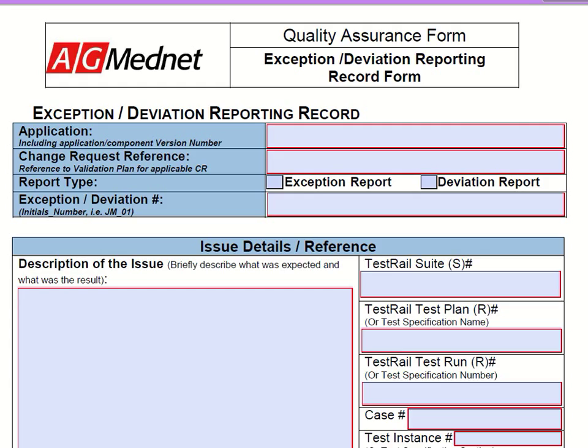When the software has been frozen, the documentation has been approved, as well as your test scripts. The test scripts have been approved. So this is a point of a regulated project where you are verifying software functionality in a functionally frozen environment. So in that case, if we do run into any issues, they need to be recorded. And so that's what these exception reports are designed to do.